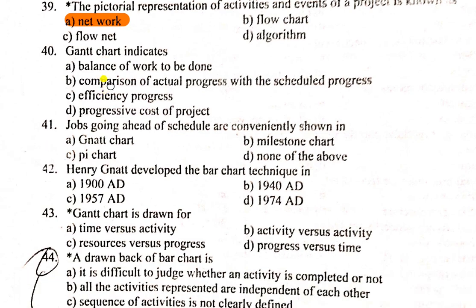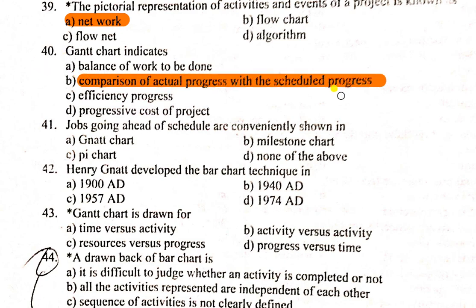Question number 14: Gantt chart is introduced for the balance of the work to be done, comparison of actual progress with the scheduled progress, efficiency of the progress, and progressive cost of the project. A Gantt chart is basically a bar chart from which we can determine how many days each task of a project will take. It is used to compare actual progress of work with the scheduled progress of work.